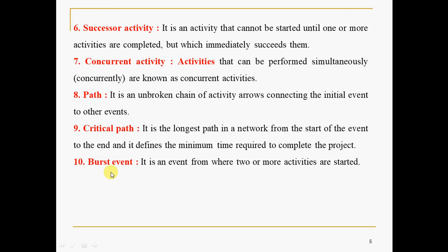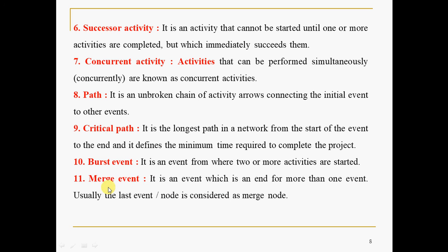And the last but one is burst event. It is an event, it is not an activity. It is an event or node from where two or more activities are started. Usually, the first event or first node is called the burst node. Merge event or merge node. It is an event in which all the activities are going to terminate. Usually, the last event or last node is considered as merge event.